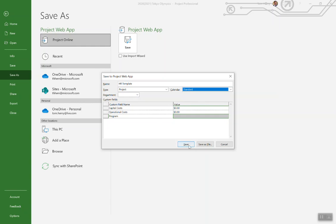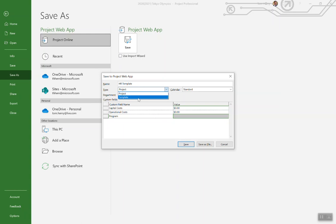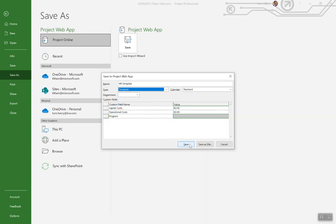You can specify which project calendar you want to create or add for this project. At this point, I'm just going to press on the type and select that template. That's the differentiator. When I save it as a template, it's going to save it up so that I can use it on future projects as part of my enterprise project type. We talked about that in a previous video. We press save.